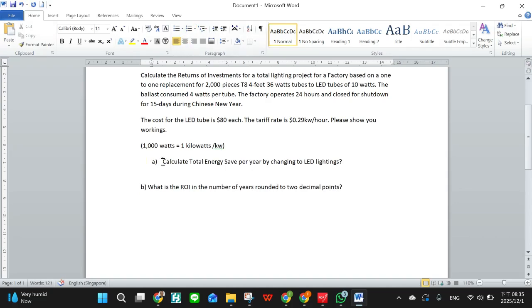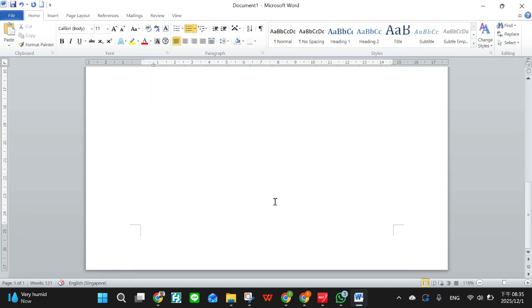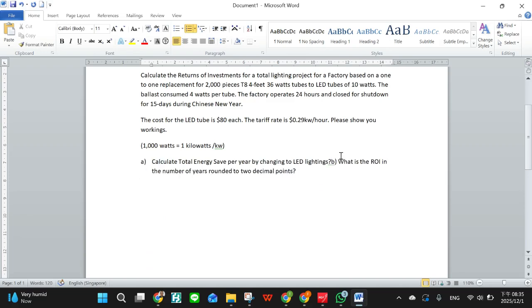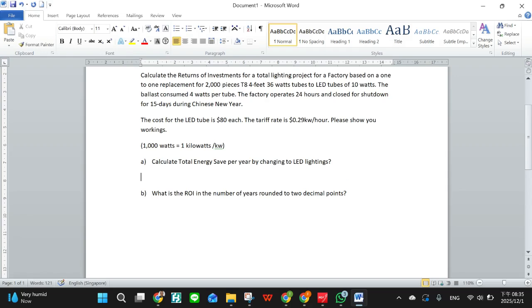Same for your system uptime, your planned preventive maintenance, your response time. Say the projector lamp is not working. Your response time is 4 hours, but straight away there's no spare part. The spare part comes 1 week later, and you get penalized because there's no spare part.